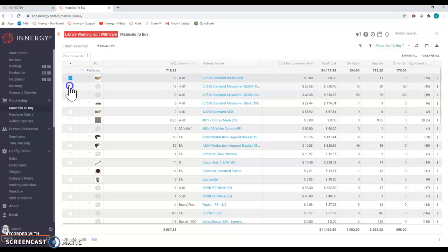The second part of this is I can't add materials to an existing purchase order. That seems pretty important to me as part of purchasing. When I have an existing purchase order, we typically start by ordering materials for a project and then just toss our stock materials onto that. I would imagine that's pretty typical. I need to be able to add to an existing purchase order. I'm going to go ahead and cross that off my list.